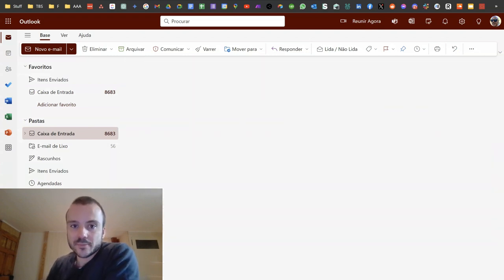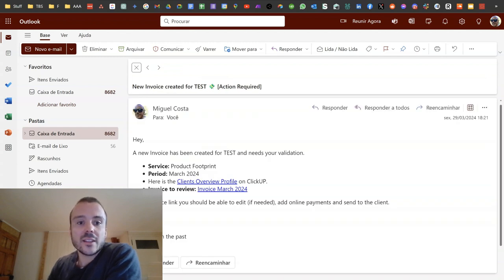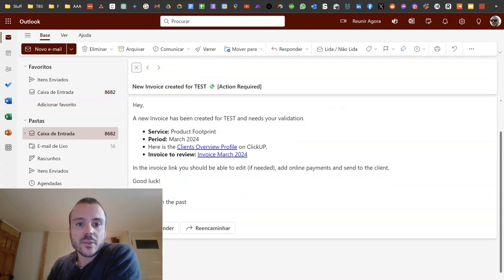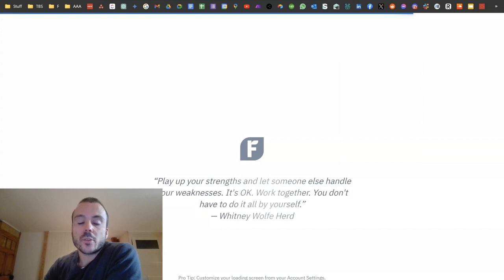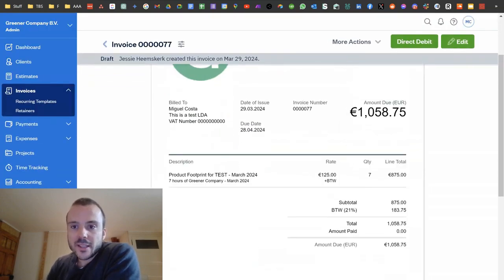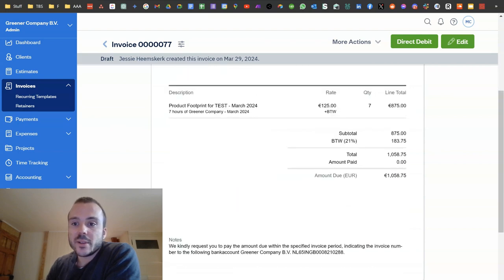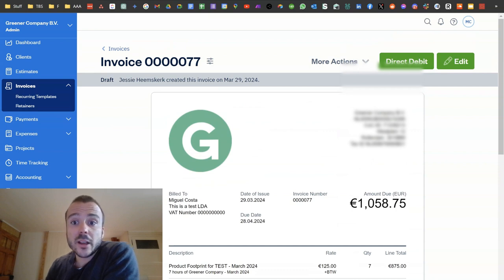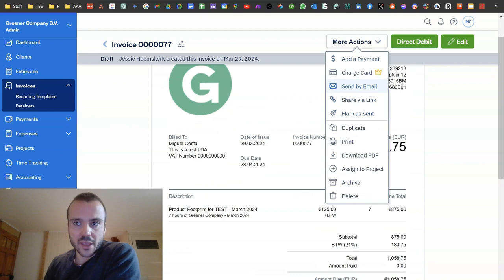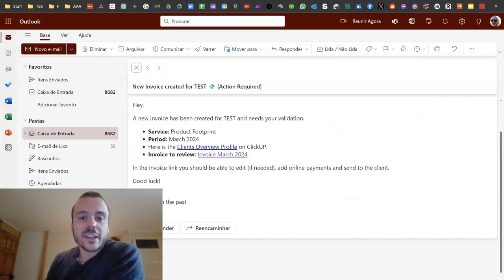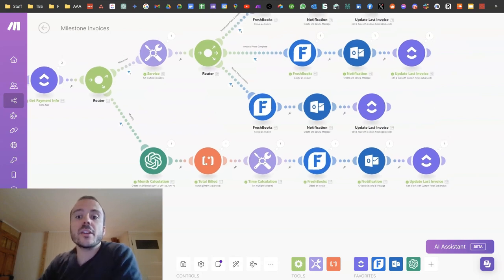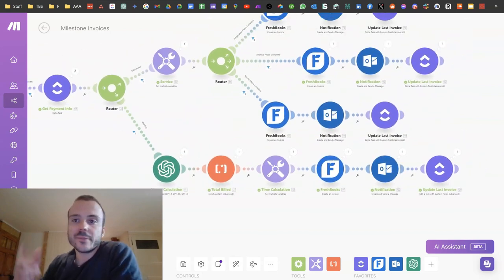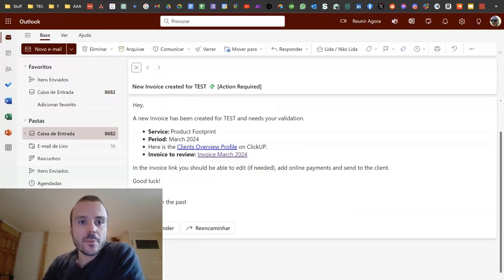I also emailed myself two examples. For 'test': a new invoice has been created for 'test' and needs your validation — service, period, here's the client overview profile on ClickUp, and the invoice to review. If I click here, I land directly on the invoice in my invoicing system. As we can see, 7 hours has been billed over a rate that is previously determined, the description is automatically filled, and it is correct. From within the invoicing system I can send by email to the client, create an email myself, or even change the automation to create a draft in my email provider for one-click validation.